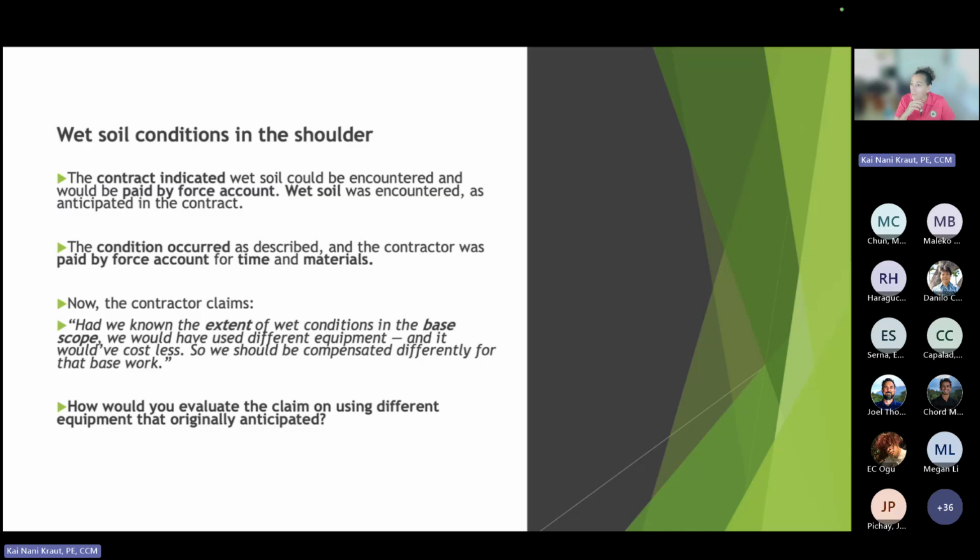They can't go look at it and then say, nobody's going to know this, so let's not say anything, and then when we get the contract, come back and say, oh, that was differing site, it wasn't in the plans. So if it's obvious and they can't access it and they don't understand the depth of it, then during bid, they have to ask the question. Let me go through, because I think I have something in here that addresses that. If not, let's come back to it.